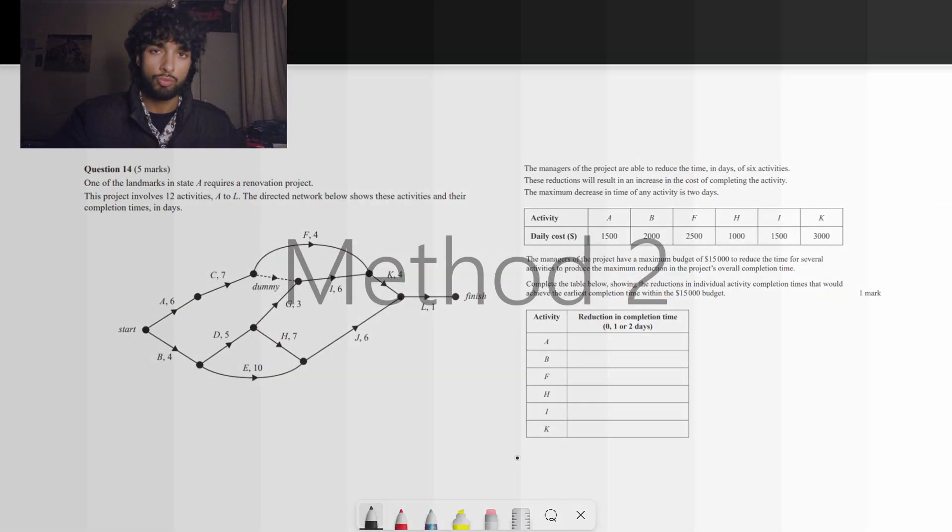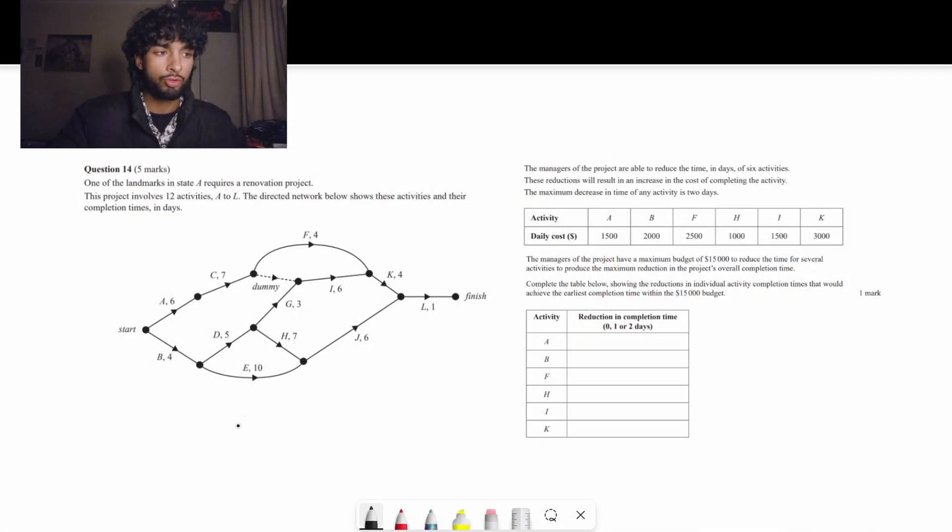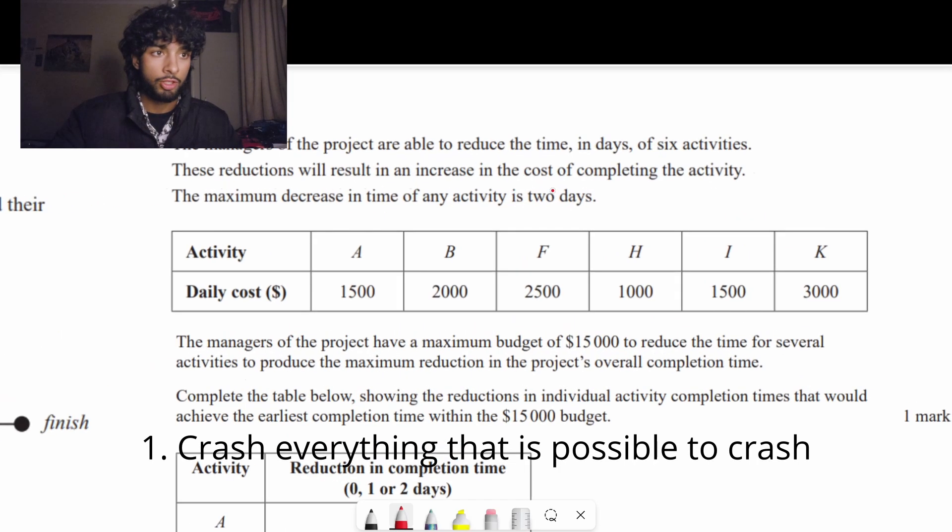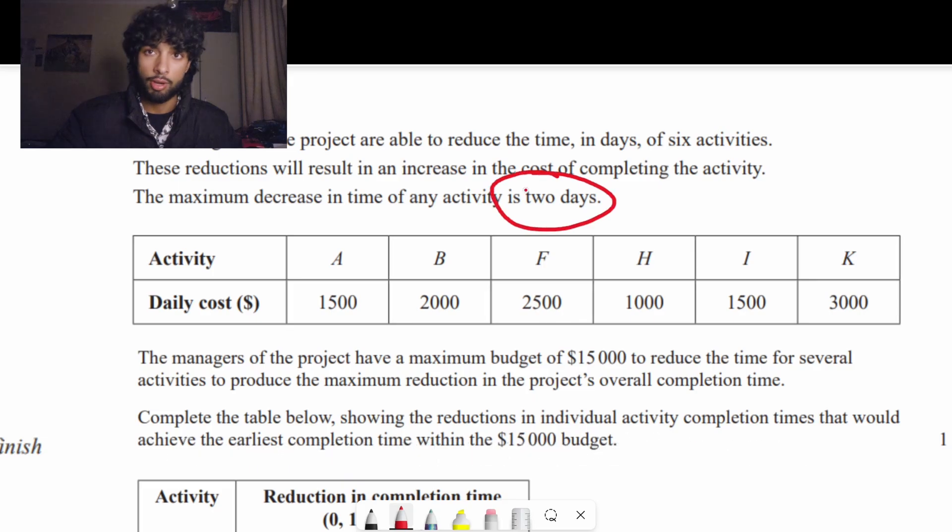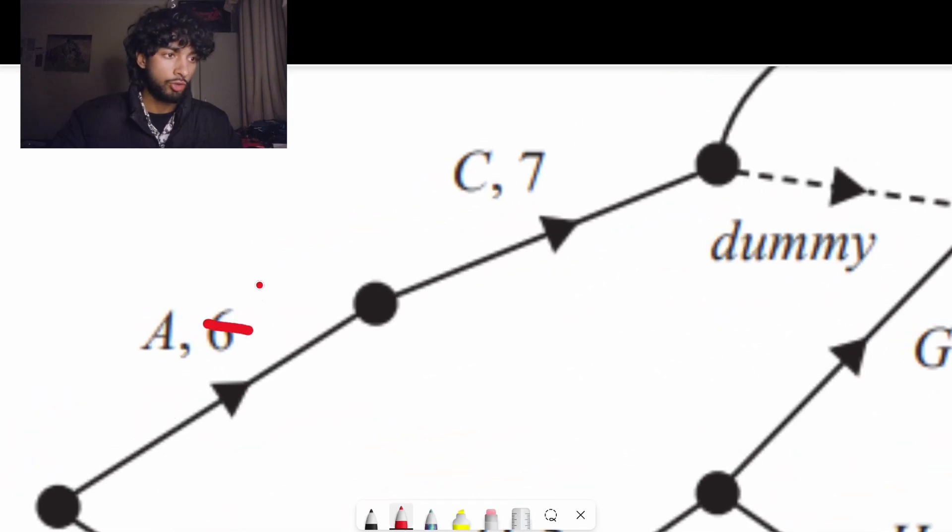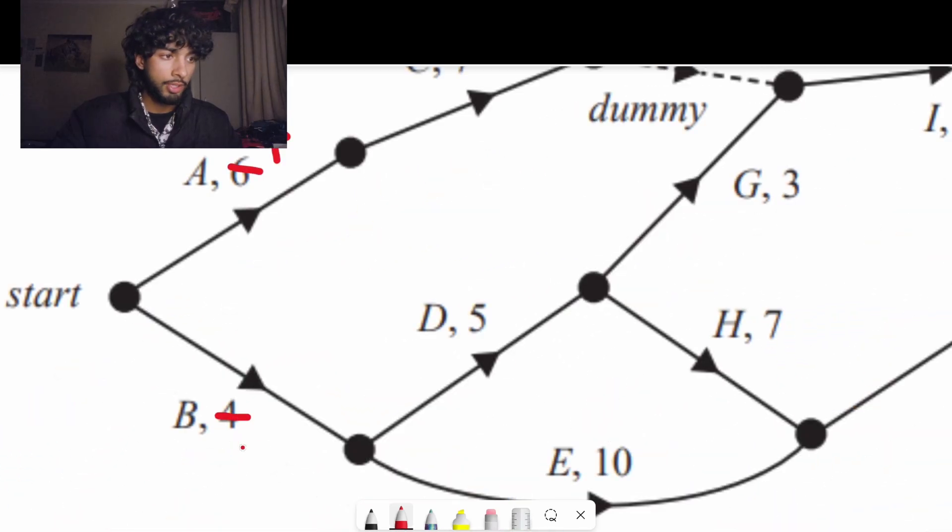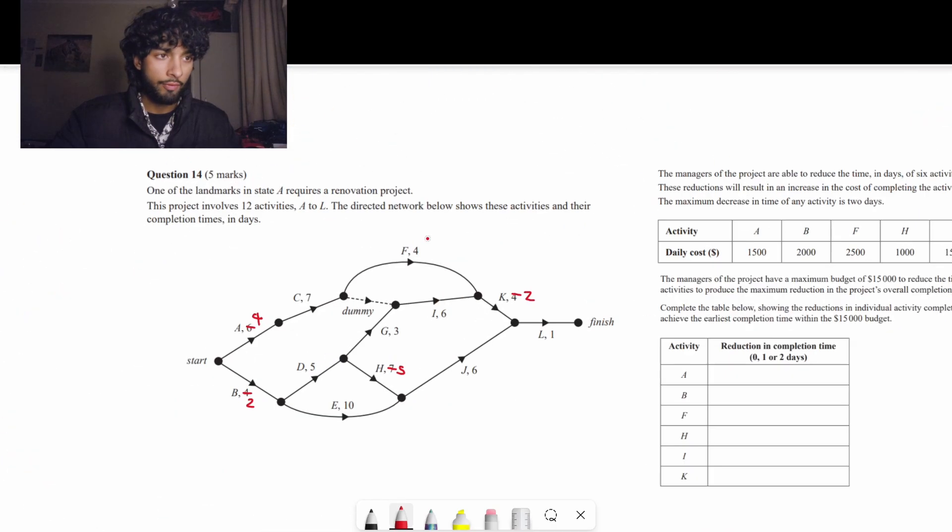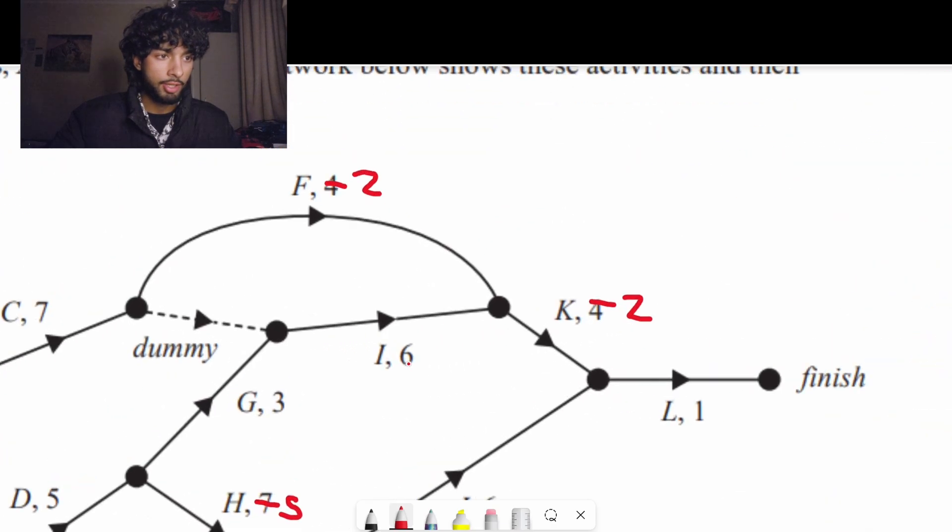Now we're going to be moving on to method 2. So method 2 has the same principles as method 1, but we're going to be doing it in the opposite order. The way we're going to apply it is we're going to crash absolutely everything, no matter what, as much as possible. So we know that every activity can be decreased by a total of 2 days. So A, B, F, H, I, K can all be reduced by 2 days.